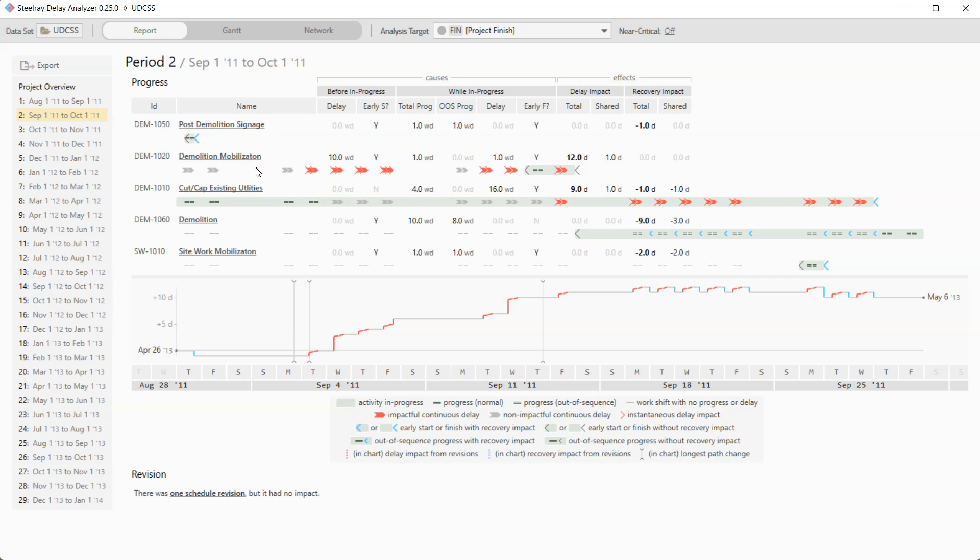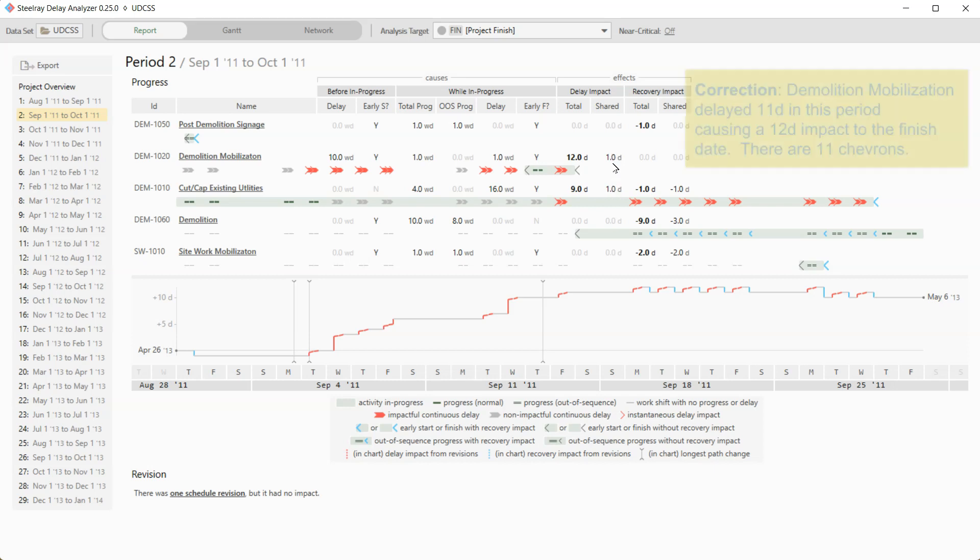Demolition mobilization gave us 12 days of delay, meaning it pushed the finish date 12 days. But one of those days, it was sharing the delay with another delay. And that's where the icons can tell us, if I look, I'm looking for icons that are on the same day. And I can see one day, Friday, the week of September 11th, that both demolition mobilization and cut cap existing utilities were delaying. And so that's probably why in the shared column, you have one day of delay, one day of shared delay.